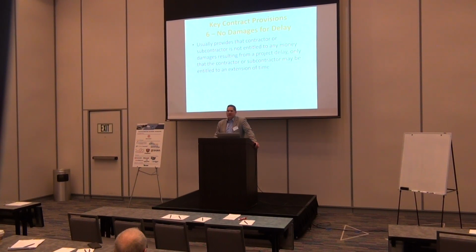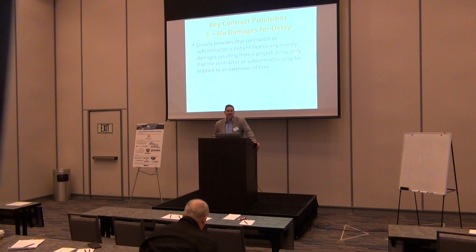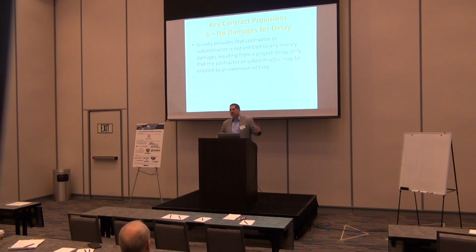Particularly if you have to mobilize to a project and you're incurring general conditions and operations at the site, you're assigning people to the site, manning the site, superintendent, the project manager, trailer, storage, all those kinds of things, and the drawings aren't ready for 6 months. That's a real cost that you should be able to recoup. And a clause in a contract that says no damages for delay could keep you from recovering that.